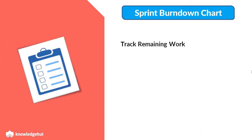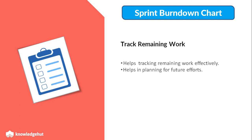Second, Track Remaining Work. The Sprint Burn Down Chart shows how much work is remaining to be completed. This information helps in planning for future efforts. It also gives a rough picture of how much time would be required to complete the whole work.